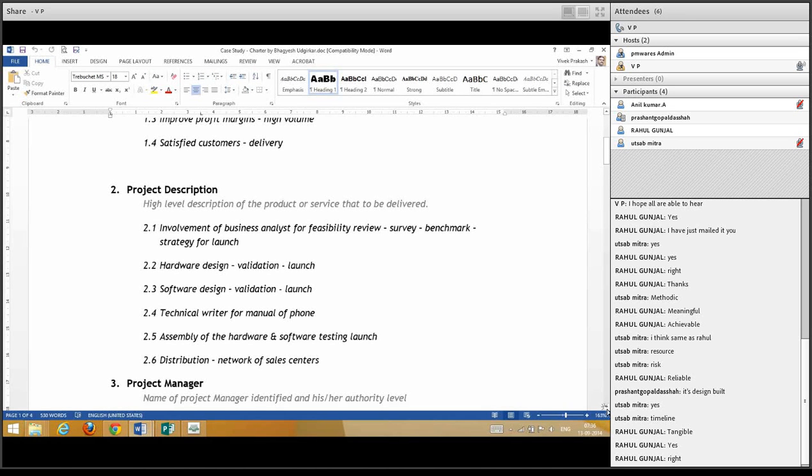Budget is fine, but normally when we write a budget in a project charter, it is a broader budget. You may not be that specific. You have written 49,000. Maybe if you had written 50,000, I would say it is a high level budget, but it is appearing very specific. At this stage, when you are starting the project and putting this charter together, you may not have a very accurate idea of the cost.